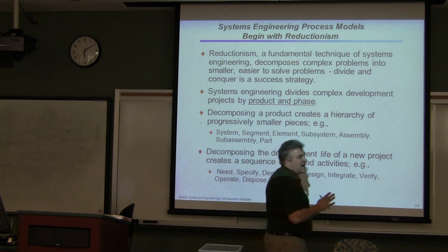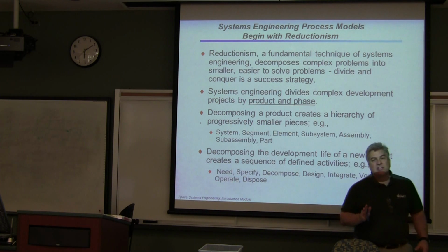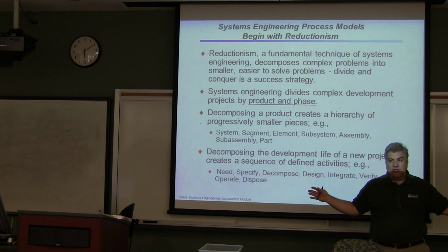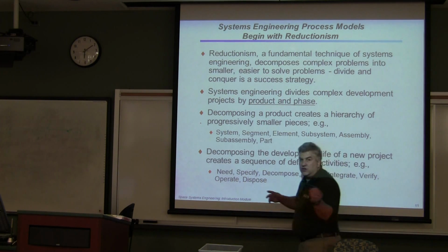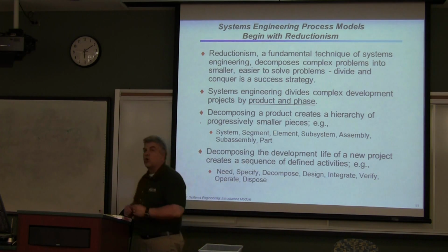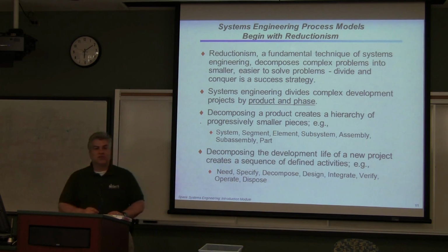How do you start a design? The best way to start a design is to reduce your entire product into smaller pieces. We've seen this before in senior design as something called a work breakdown structure, where you say, okay, remember this little robot we talked about? The walking bipedal one? What are the different pieces that you could think of for that robot?